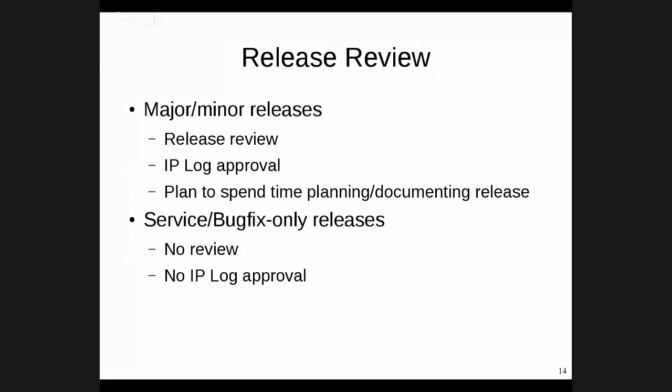So the release review. For every release, we require a review. Sorry, let me restate. For major and minor releases, we require a release review. A release review is a formal process of assembling documentation and confirming and validating the intellectual property log for your project. Plan to spend about 30 minutes or so documenting your release. Planning probably takes longer than that, but documenting your planning certainly shouldn't take too long.